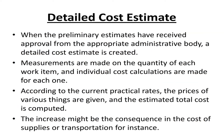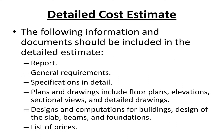Detailed cost estimate: When the preliminary estimates have received approval from the appropriate administrative body, a detailed cost estimate is created. Measurements are made on the quantity of each work item, and individual cost calculations are made for each one according to the current practical rates. The prices of various items are given and the estimated total cost is computed. The increase might be the consequence of the cost of supplies or transportation. The detailed estimate should include: a report, general requirements, specifications in detail, plans and drawings including floor plans, elevations, sectional views and detailed drawings, designs and computations for buildings such as design of the slab, beams, and foundations, and a list of prices.